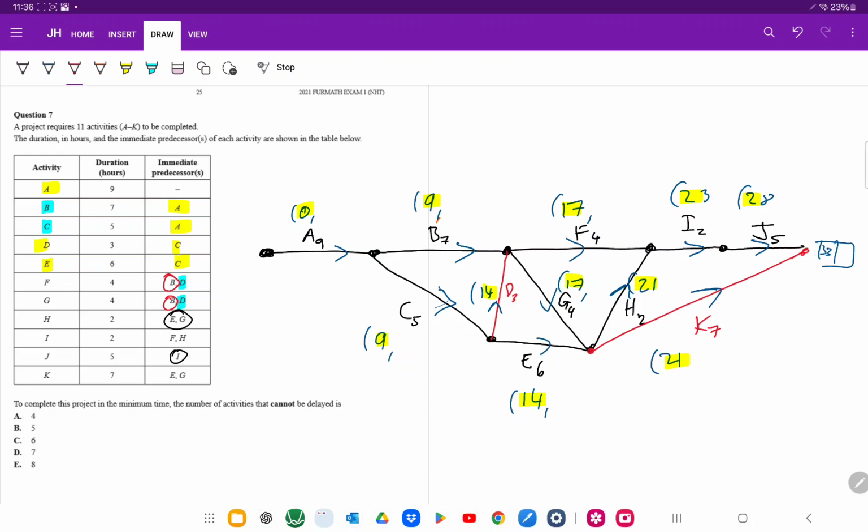So we get 33 goes there. 33 minus 5 is 28. 23. Okay, 33 minus 7 will give us 26. In this case, we've got 23 minus 2, which is 21, goes here. From this top one, we get 19 from the top.